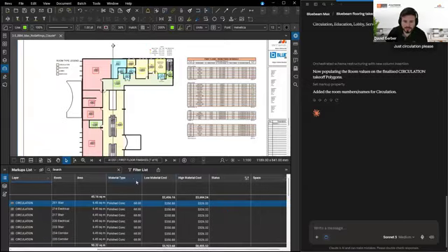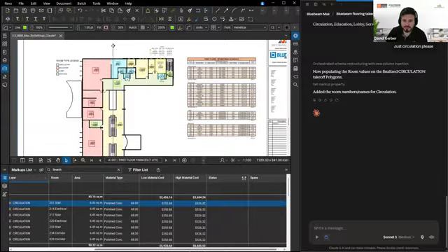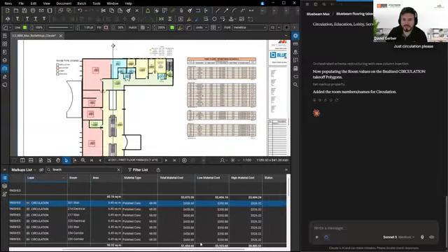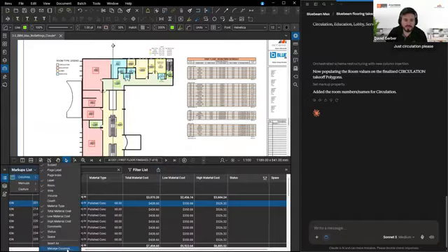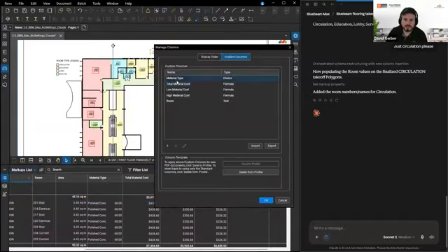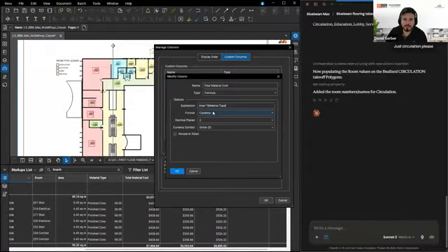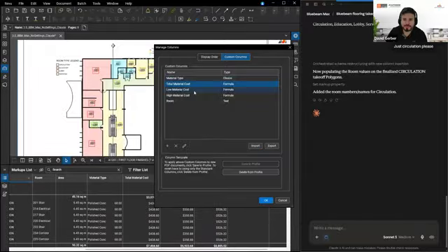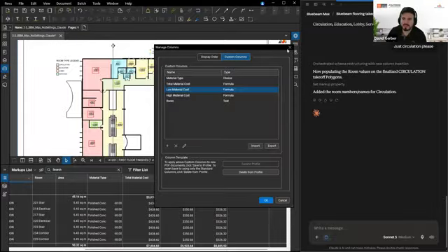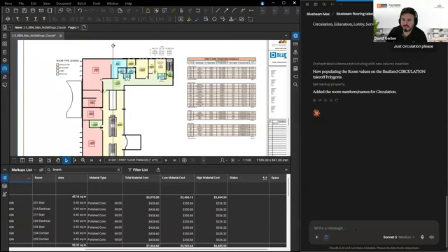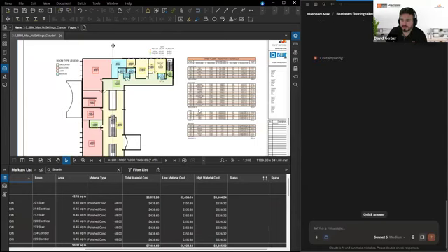So I want to double check my pricing as well. If you remember, it was checking the location of our project. I have my total material costs in my custom columns. Essentially it's just taking the material times the area. And then I have a low cost and a high cost. I just did plus minus 20% just in case, just to give me a gauge. And then I can just say all done.